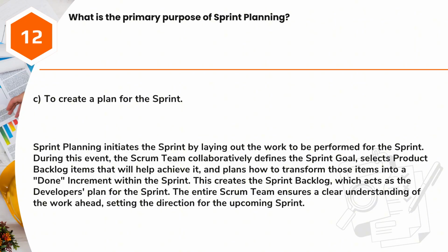Answer: C. To create a plan for the sprint. Sprint planning initiates the sprint by laying out the work to be performed for the sprint. During this event, the Scrum team collaboratively defines the sprint goal, selects product backlog items that will help achieve it,